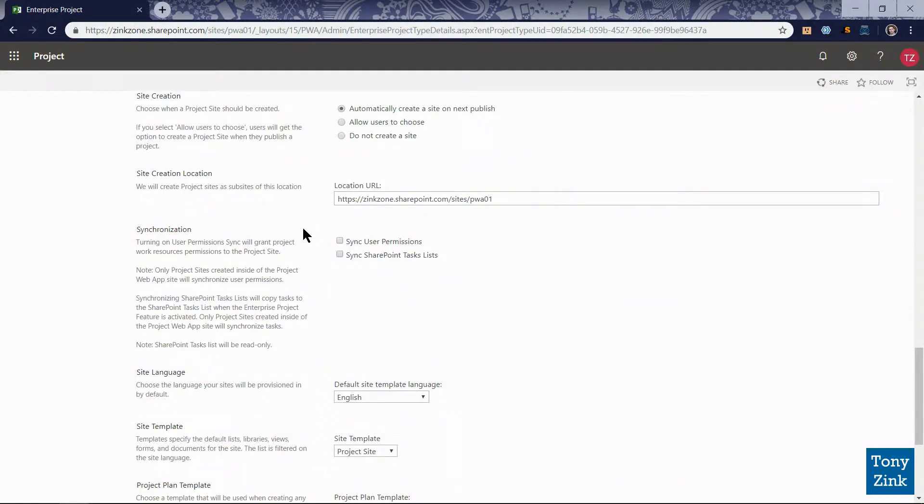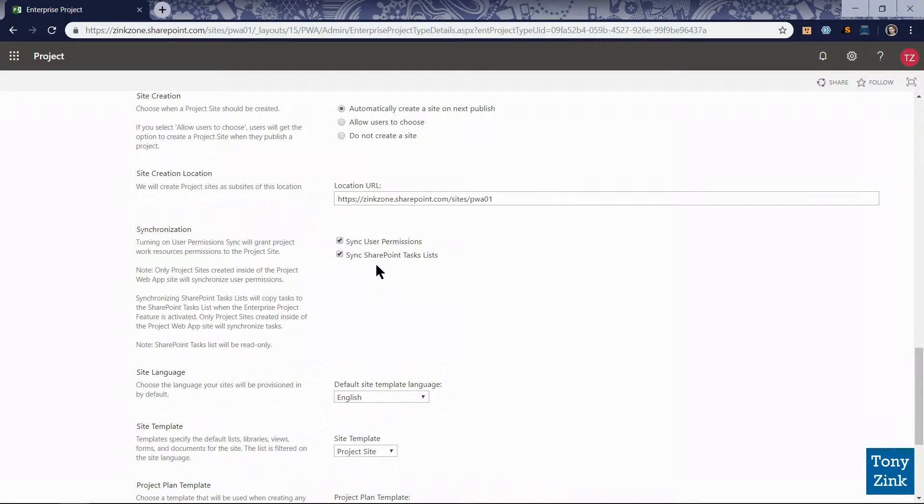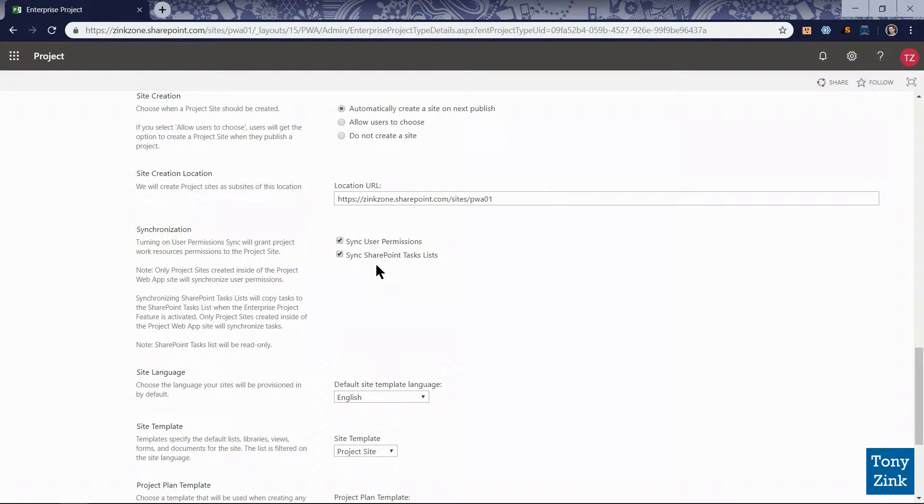Moving on down here I'll go to the synchronization area and there's two options here that I'm going to turn on. Sync user permissions which automatically synchronizes or automatically grants access to any team member on that project to that project's project site. And then sync SharePoint tasks lists which automatically populates a tasks list in the project site with the tasks from the project schedule. That tasks list is read only. Team members won't be able to go in and make any updates to those tasks in that tasks list. It's more for informational purposes. If team members are accustomed to going to the project site to get the information that they need, the tasks from that project will be shown there automatically for them.